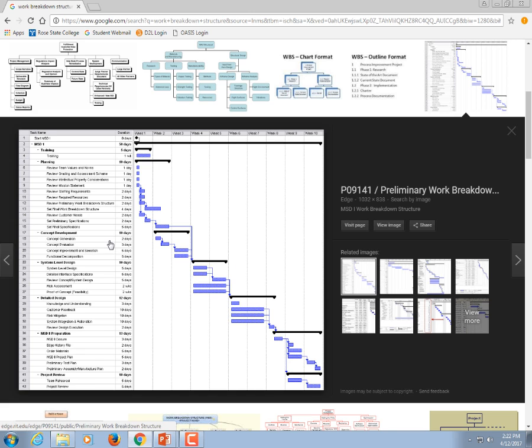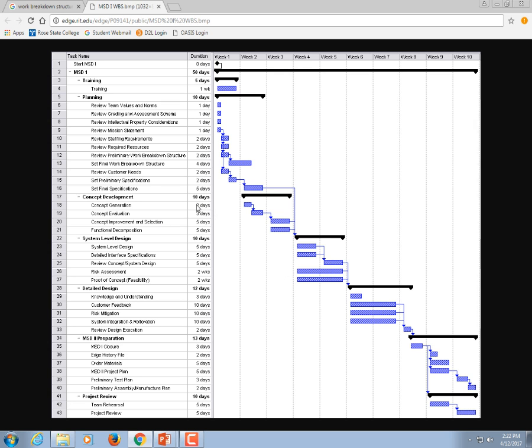Whatever this one happens to be, this is going to take 2 days, and at the end of 2 days, can I make this bigger? View image? Okay, so this here is going to take 2 days. Then at the end of 2 days, this guy's going to start. He's going to take 3 days. And at the end of 3 days, this guy's going to start for 5 days. But this other one can also happen concurrently for 5 days. And as those two end, we're going to come into the level design. And then we're going to go to this.